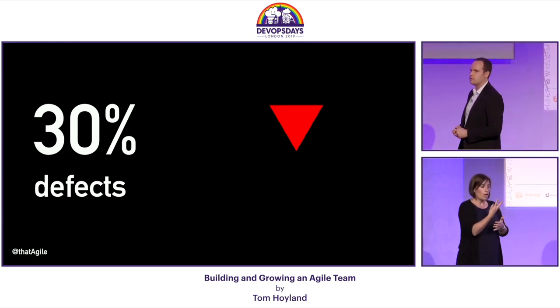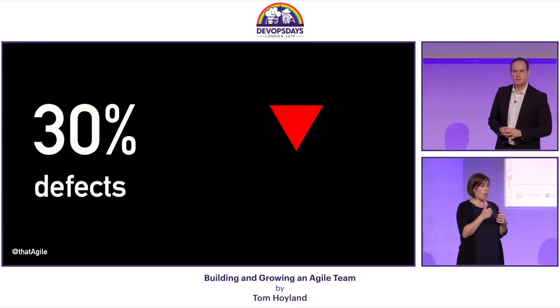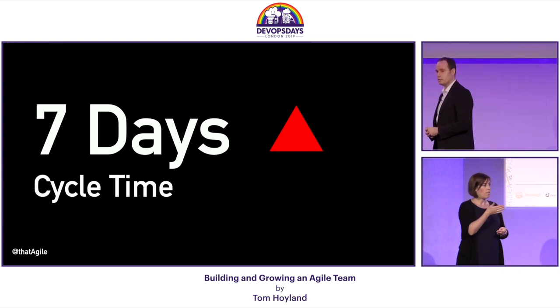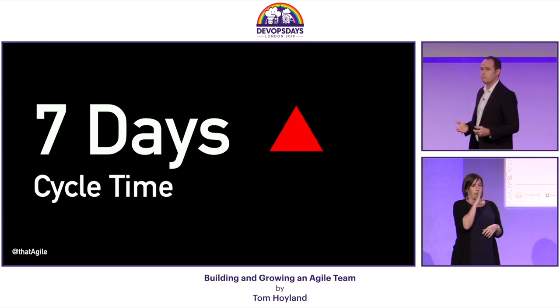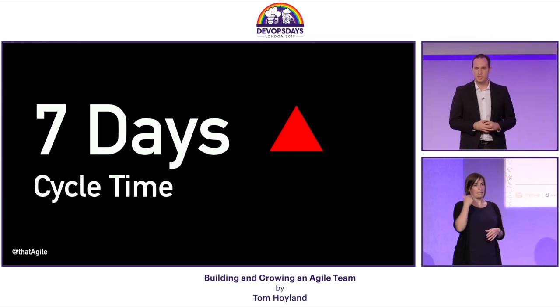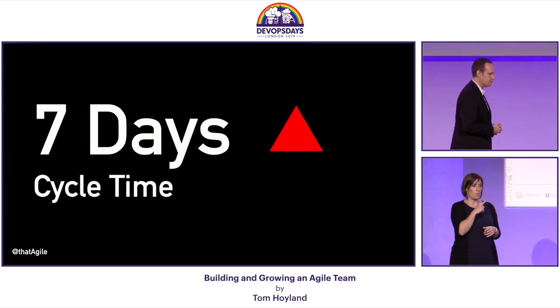But the stats aren't all good, because one of the key stats here is cycle time. And cycle time hopped up. It went up from 5 days up to 7 days. And this made us sad. But the reality was, it had always been 7 days. But now we know that, we can do something about it. This is all about increased observability, increased visibility.